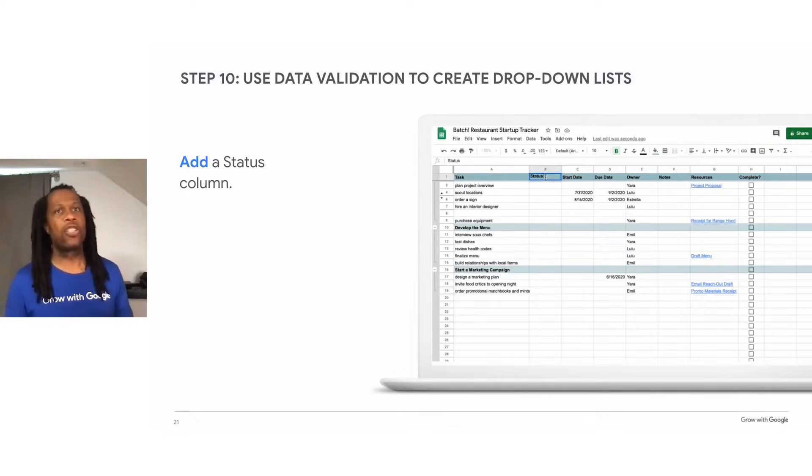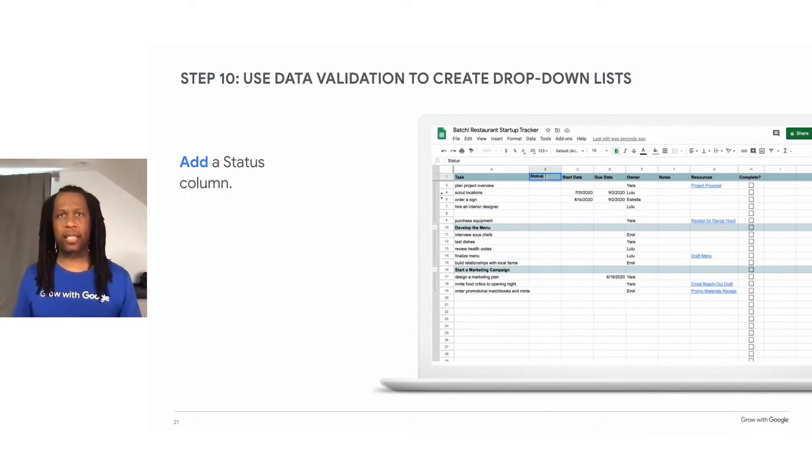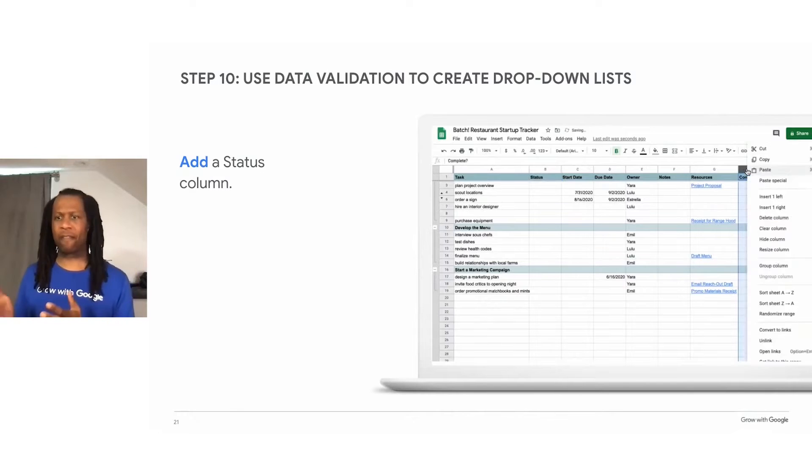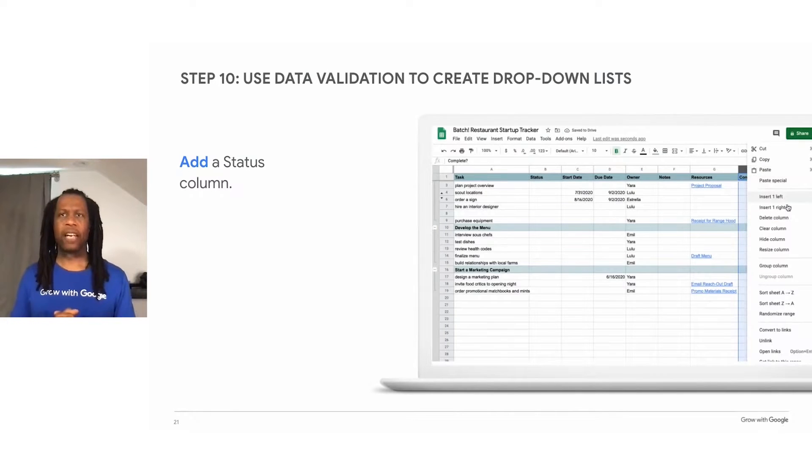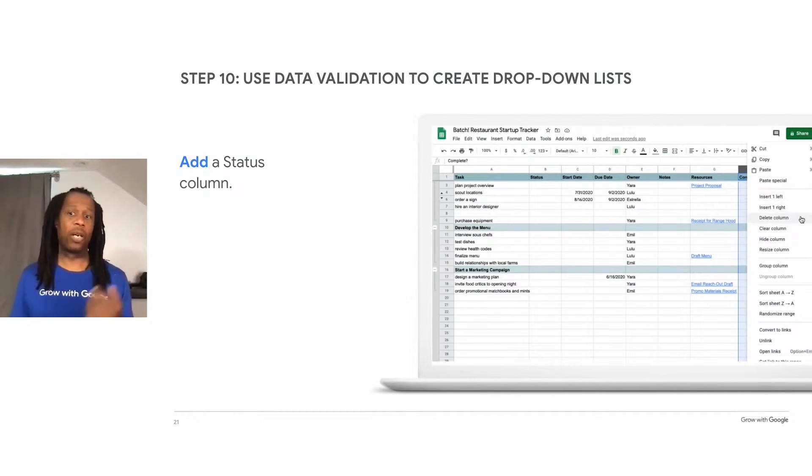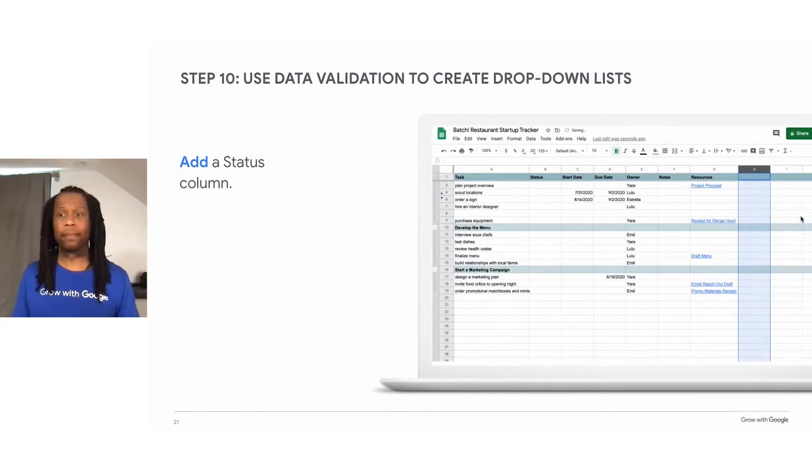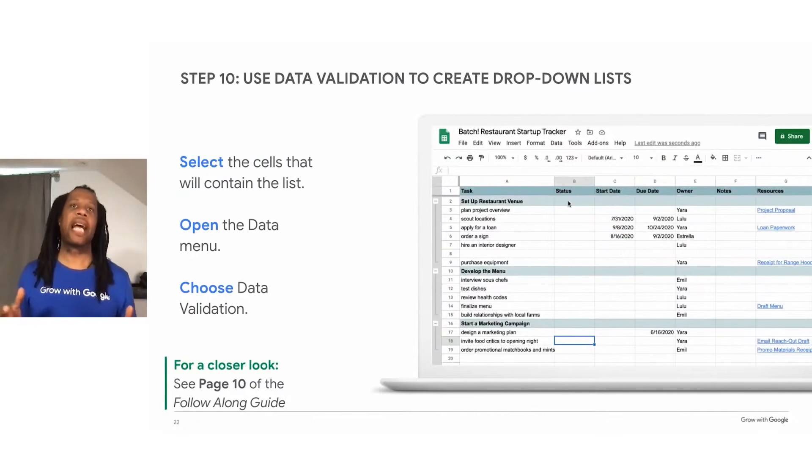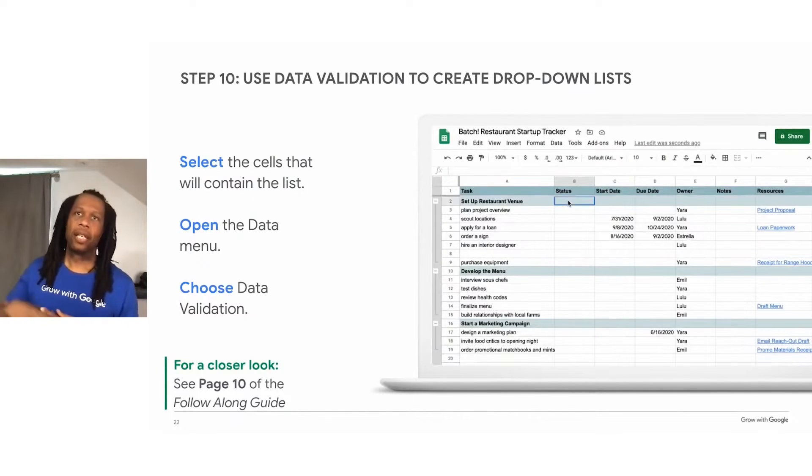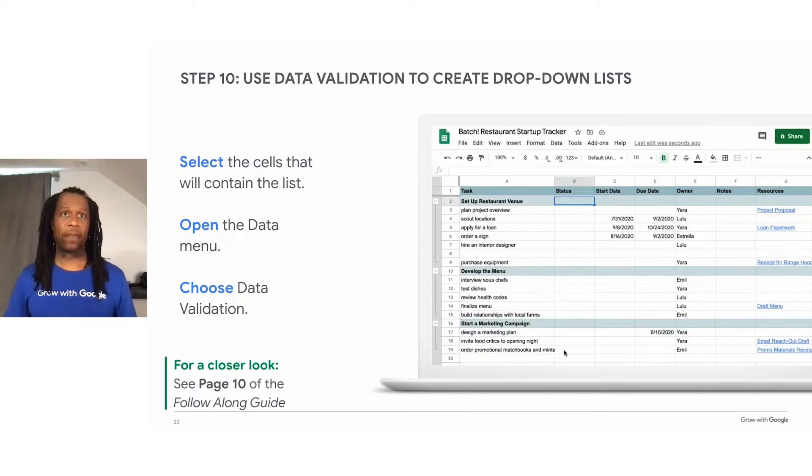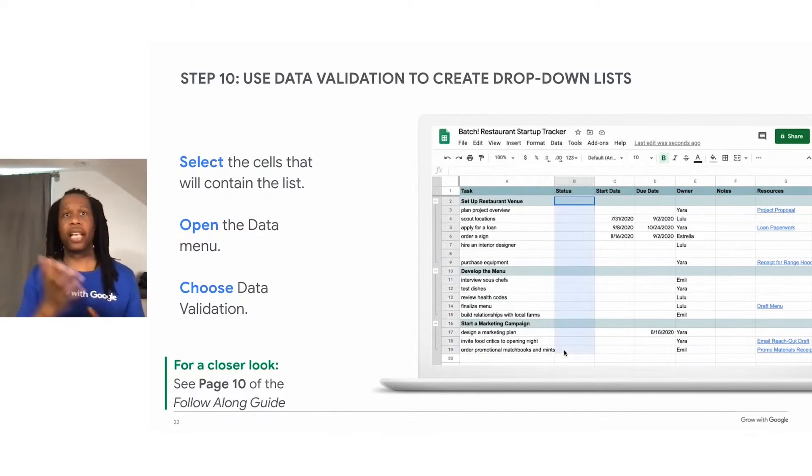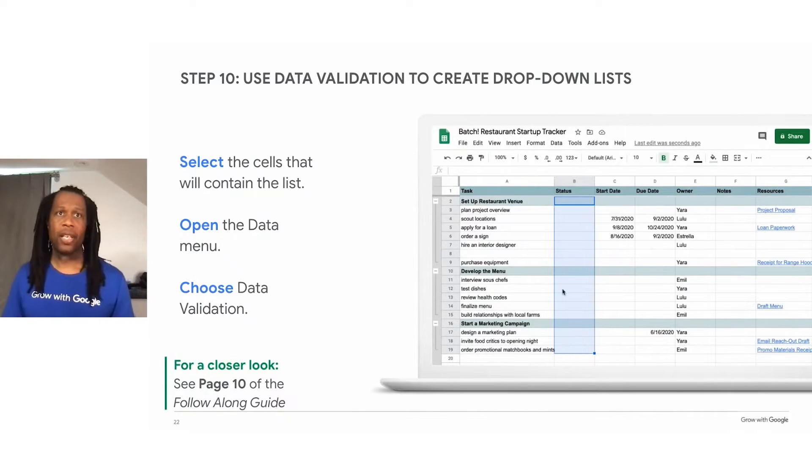If you want to, you can totally delete the complete checkboxes since this new status column will contain the same kind of information. We don't really need the duplicate information. Or you can keep it. Next, select the cells in the status column down to the bottom of your task list. And then open the data menu and then choose data validation.